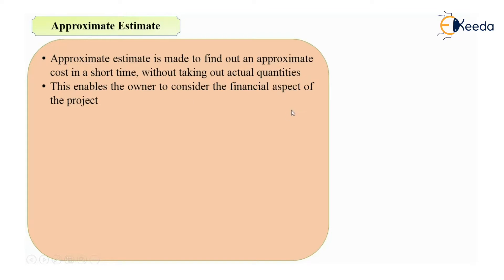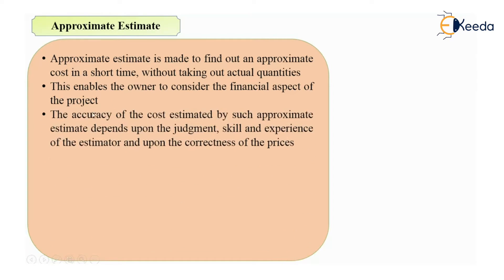This enables the owner to consider the financial aspect of the project. For example, if an owner asks you what the probable cost of their structure will be so they can raise funds and be financially prepared before construction, you can answer that in a short time. The accuracy of the cost estimated by approximate estimate depends upon the judgment, skill, and experience of the estimator.